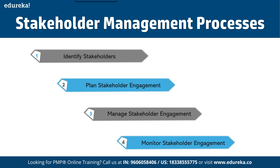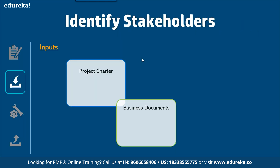Now we are going to talk about these steps one by one in detail. For identify stakeholders, we have three inputs. First is the project charter, which helps you identify the key stakeholder list. Next is the business document, which contains a business case and benefits management plan. The next one is the project management plan, which helps you have effective communication management and a stakeholder management plan.